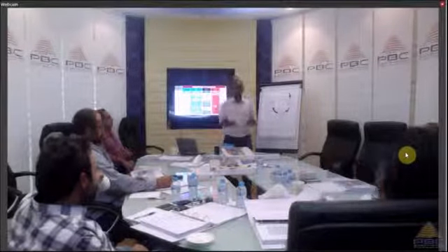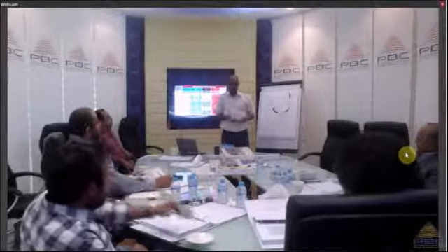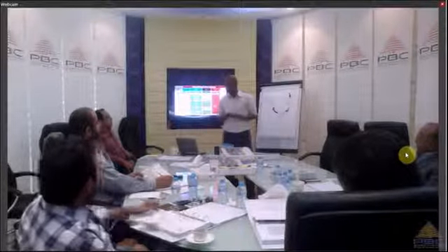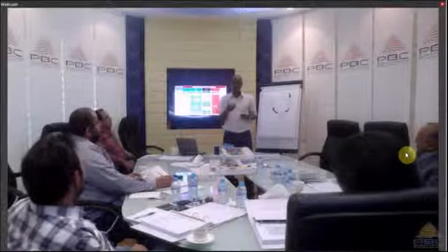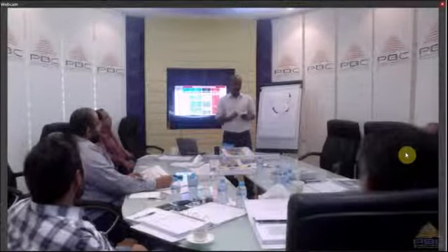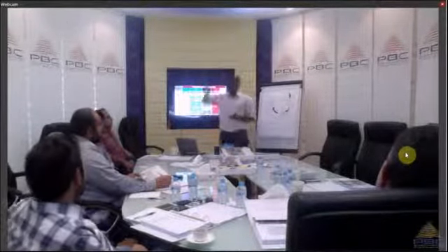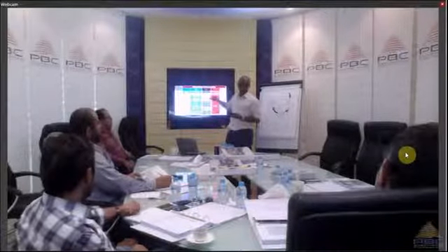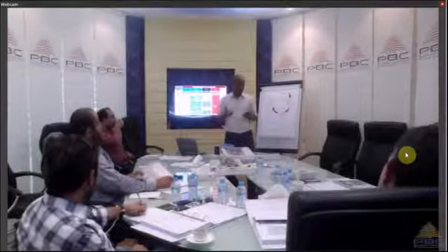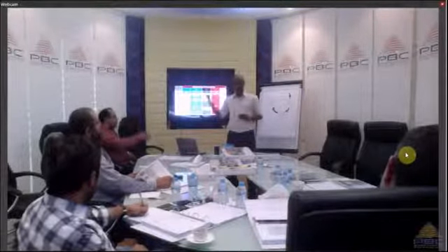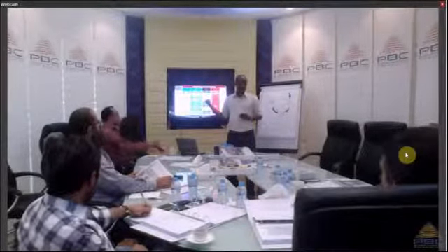No, but this throwing up and coming down is called what? I'm doing what to the product? I'm testing something, right? So it's what we call the acceptance criteria, right? And this has to be done when? Early. You don't wait for the client to start inventing acceptance testing criteria. It has to be in the scope statement, right?